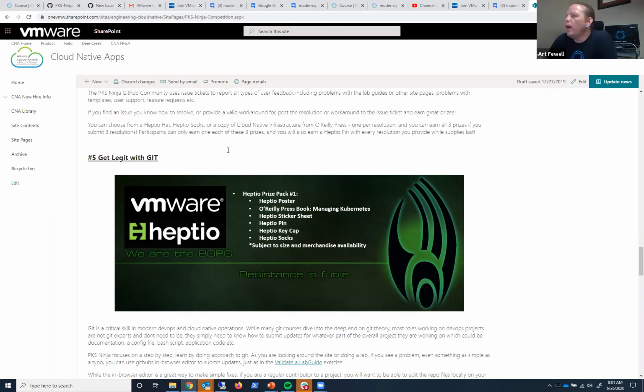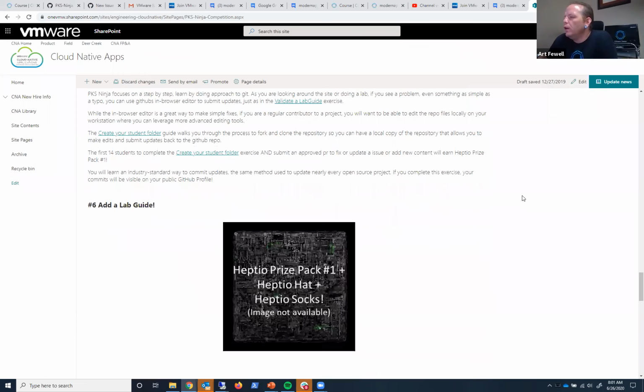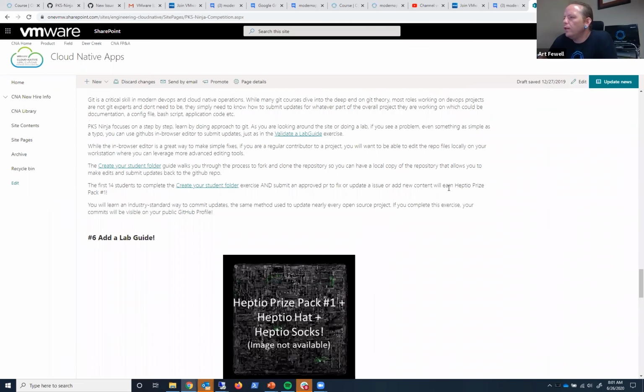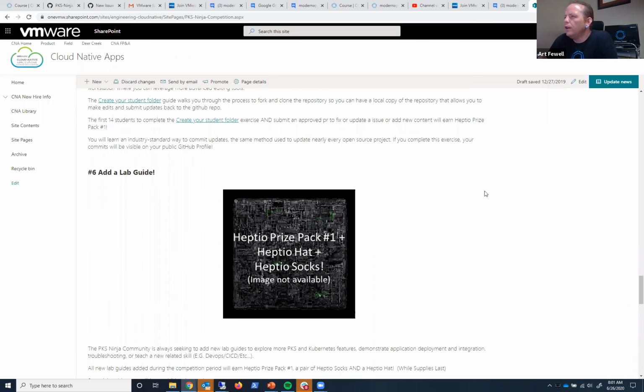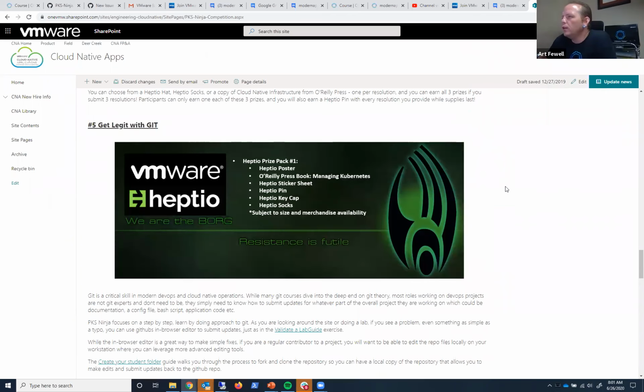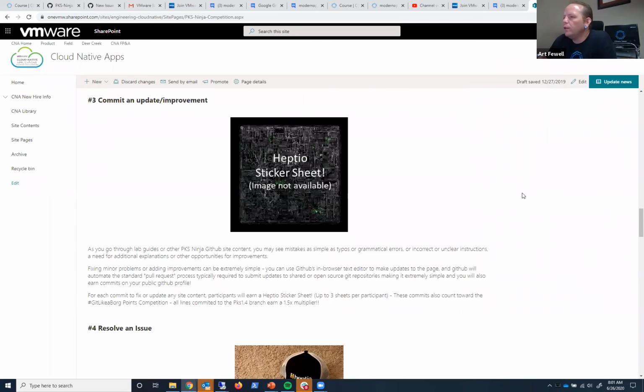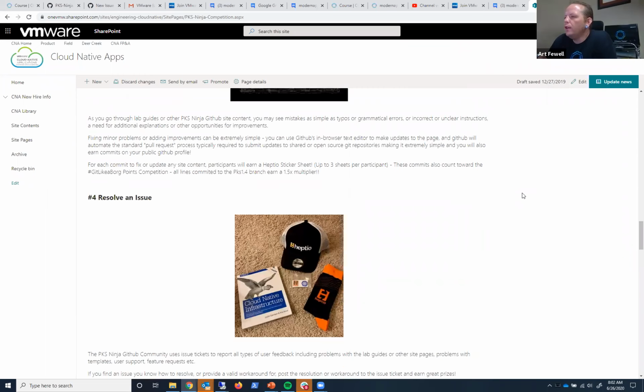And so I've been thinking about that a lot. I've been talking to Peg about what we would need to do to get competitions going again. And I don't even think it necessarily needs to be just in the context of competitions. I've been thinking, let's say there's a course that we're interested in doing, right? In an ideal world, as we build out a course, we break it into sections with a major topic and then subtopics, where one part of the subtopic is to create a 5 to 10 minute short video going over this specific subtopic, right?